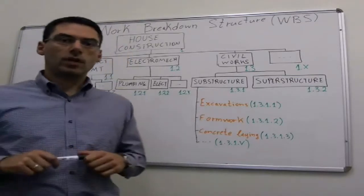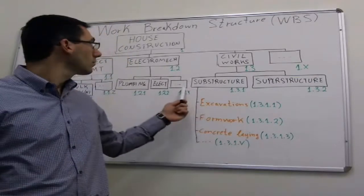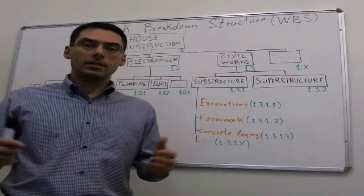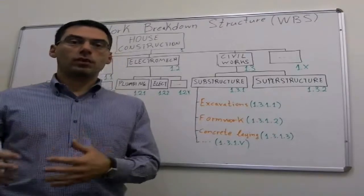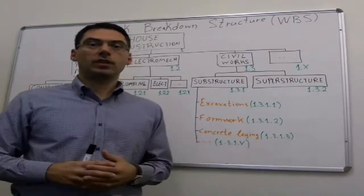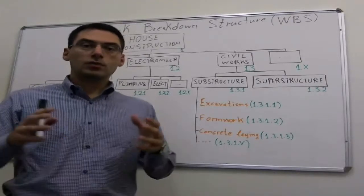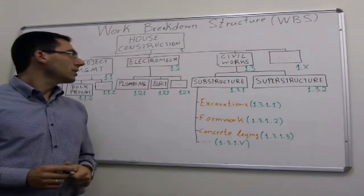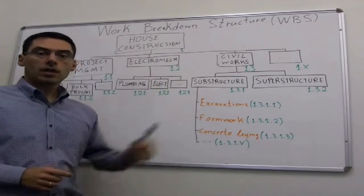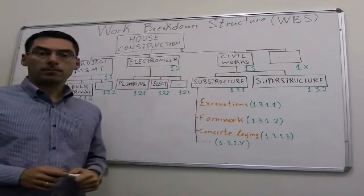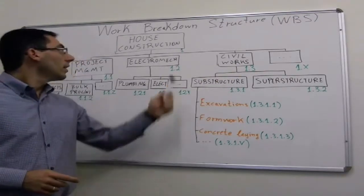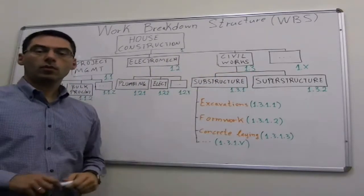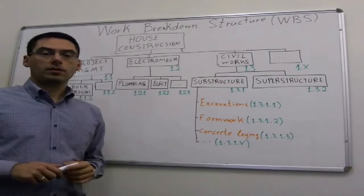In general, a work breakdown structure looks like this. What you are trying to do is analyze, break down the work that you need to do in order to deliver the product that you have been asked for in small pieces. Here we have house construction, which has a part of electromechanical works, civil works, whatever. There are levels in the work breakdown structure that analyze more and more in depth the work that needs to be done.